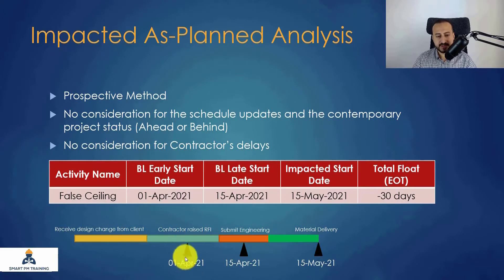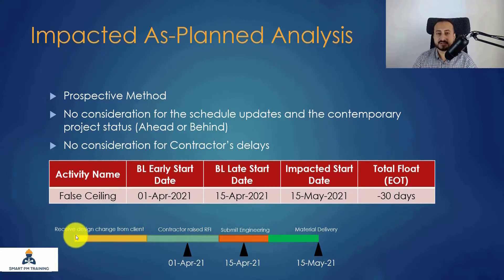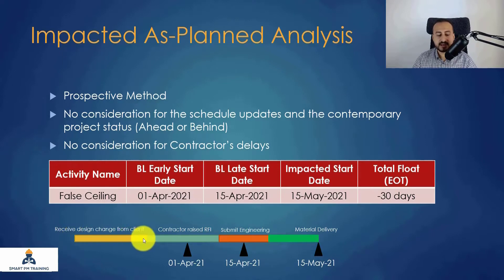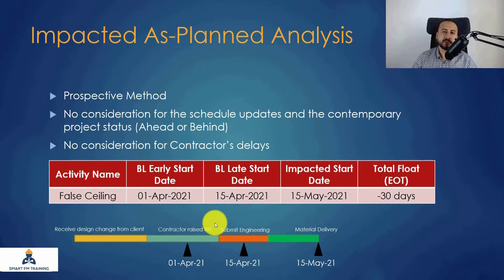Here I have the baseline early start date and one delay event from the client that actually started before the early start date — so it did not affect the activity yet. But what happens is: after the contractor receives the design change from the client, the information was incomplete. The contractor raised an RFI, received complete information, and then resubmitted the engineering.